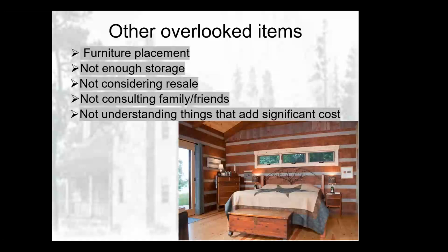And I always like to have that as a nuanced kind of conversation. We see that a lot in our business, a whole heck of a lot. Somebody says, hey, I want to add 2 feet to my plan. And it's like, okay, before we commit to that, let's talk about what that will add to your budget, so that you can make a better educated decision before you do that. Because I've seen it happen too many times where we alter the plans for someone, and then they go out and get a revised estimate, and then they come back and say, well, never mind, we can't afford that. Can we go back to the way that it was? Which is why we like to do a lot of save-as when we start working on a new file, just to make it easier for everybody.